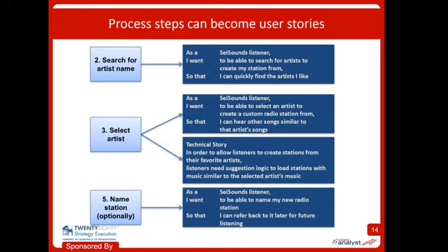Okay. If you do a process flow with swim lanes, and my process flow did not show swim lanes, that's where some of the steps are done by one person and other steps are done by another person. The handoff between some swim lanes might be a place that you can look for epics or user stories potentially, or technical stories even. Decisions in your process flow are likely to be one or more stories. Maybe a branch is its own story, for example. If I take one path, that's one story. If I take the other path, that's a different story. Okay? And each process might map to one or more stories and acceptance criteria, clearly.